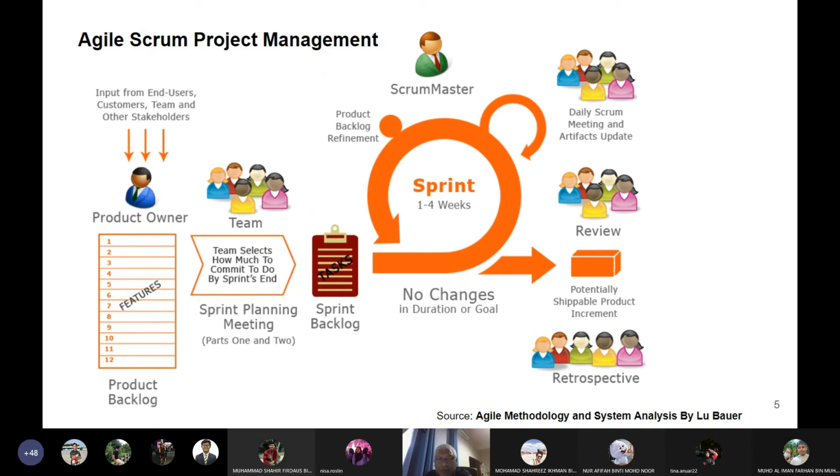So you have to group the sprint. You have to identify what is the end product of the sprint, of the 3 items. The end product will be a program of admitting the participants: advertising, getting the participants, and registering them. So those are the group in sprint 1 that you establish for the event.